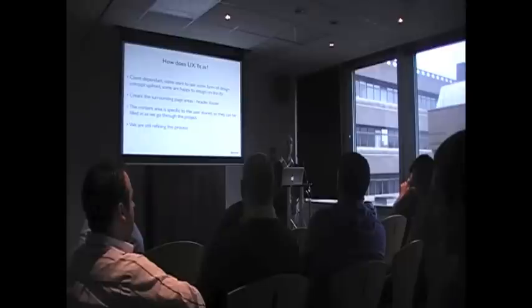Yeah, I mean, when you're doing a user story workshop with your client, it helps if you can guide them on that. If they're coming up with quite granular user stories, you can normally guide them to go, we can probably combine this into one user story and put some acceptance criteria around it. The thing with Umbraco as well is the decision of whether you make a user story for the editor and a user story for the front end person, or you make one user story and, as the acceptance criteria, you have: editor must be able to add news article, editor must be able to add 3 images, therefore the website user must be able to see 3 images. So that's the kind of acceptance criteria of we need a news article section. You know what I mean?